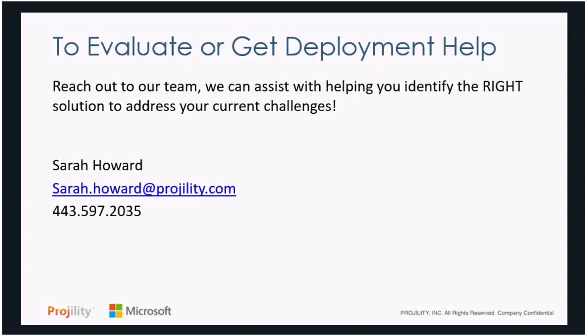So we can do team roll-ups and then aggregate these resources into teams and do reporting on the team. So that's really the idea, is that you can then assign that team resource to a task, and then anybody on that team can go do the work if you want. So it helps for aggregating resources for reporting and assignment purposes. It also helps for assigning them to specific activities where you don't know who's going to do the work, but the team is going to be doing the work.